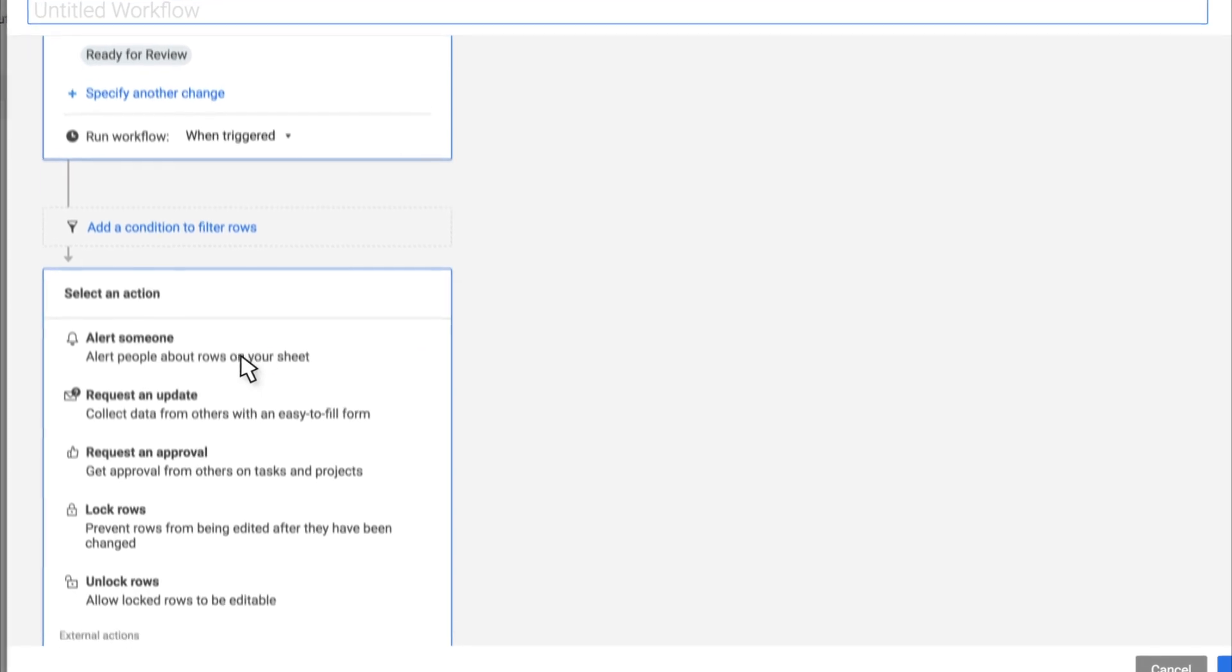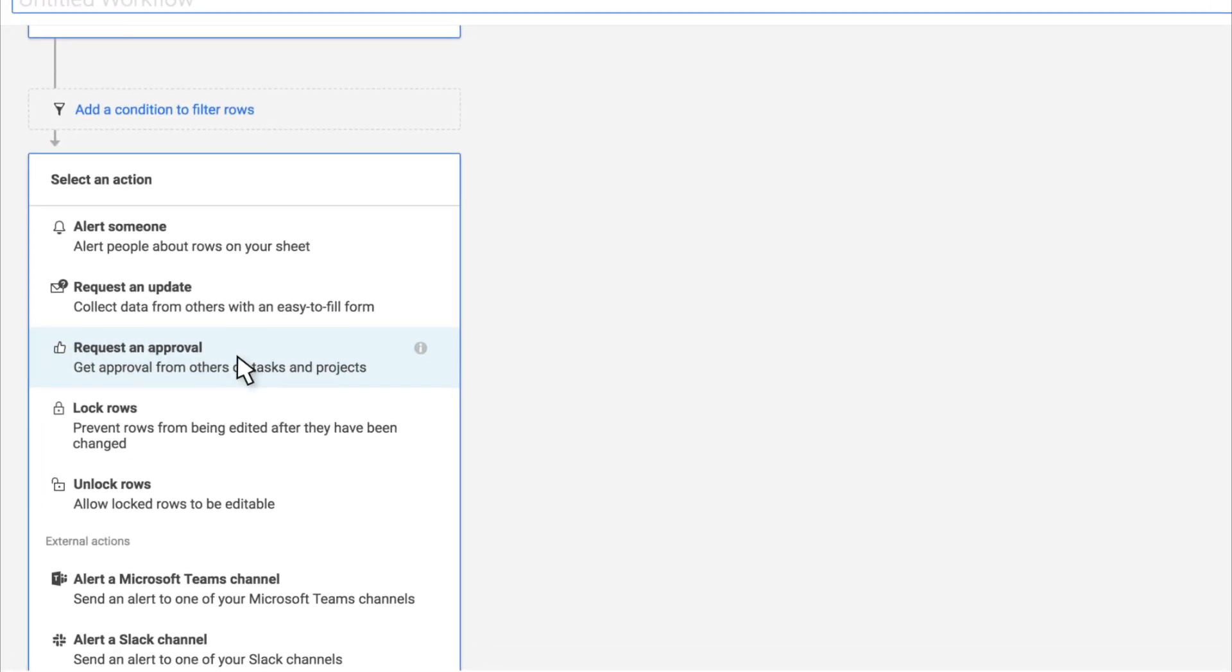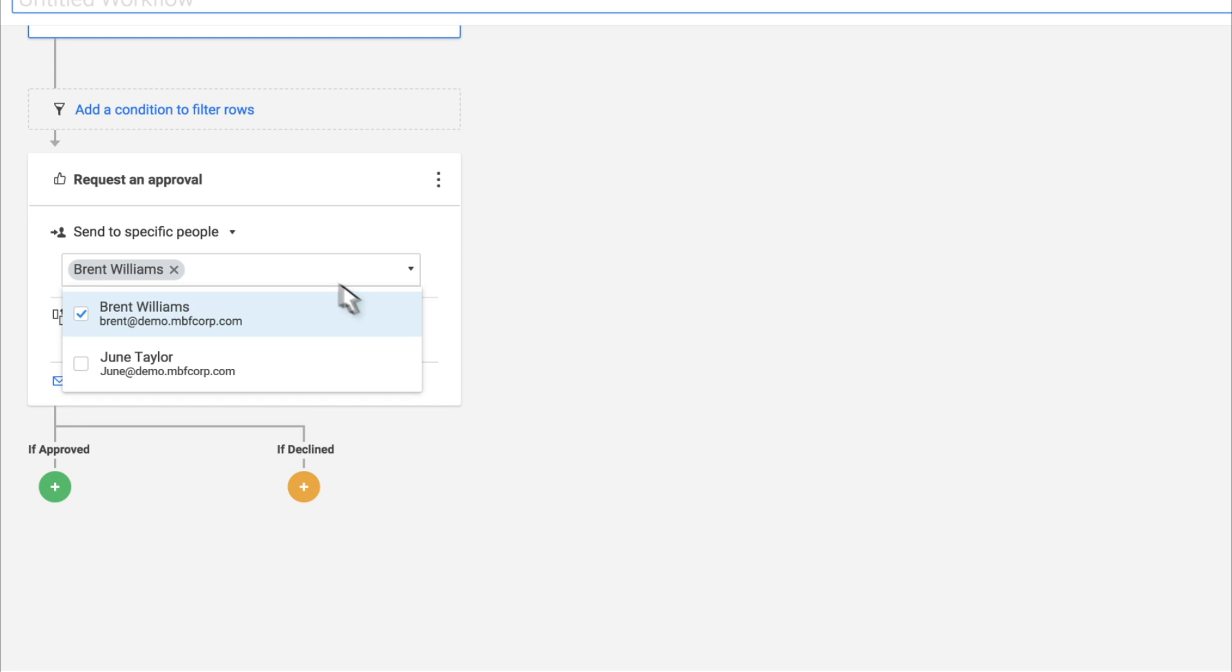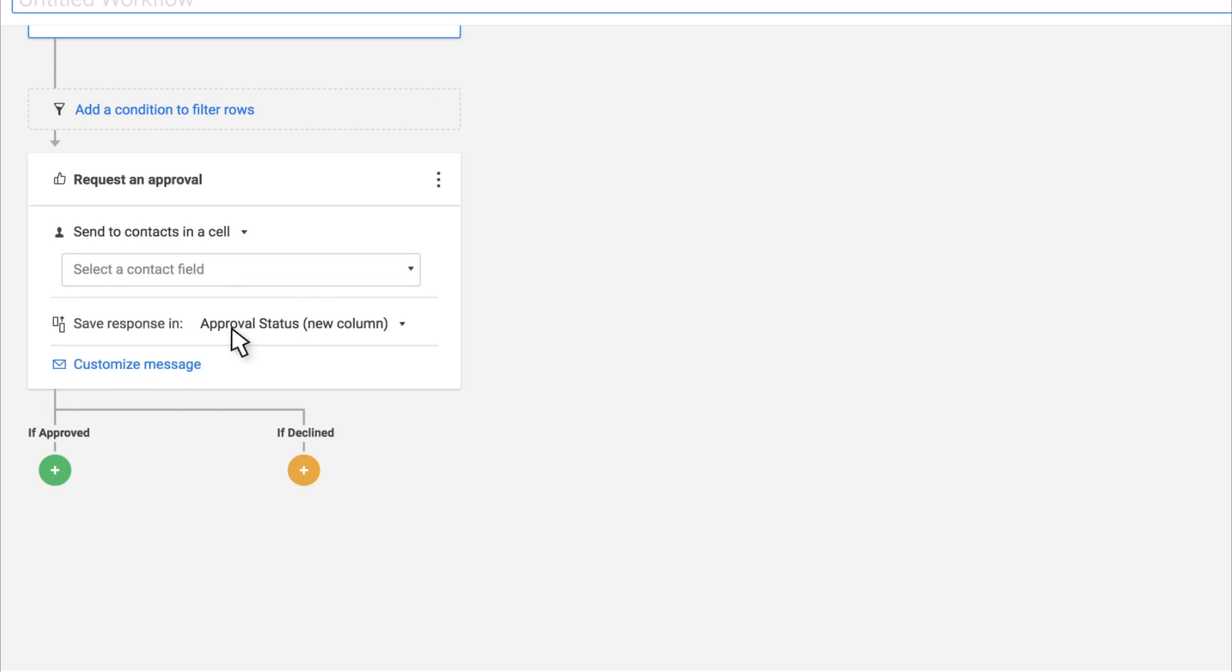First, enter an individual approver or select a contact column to ensure the appropriate person is contacted for each request.